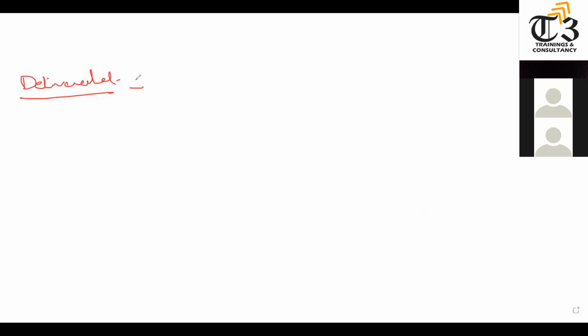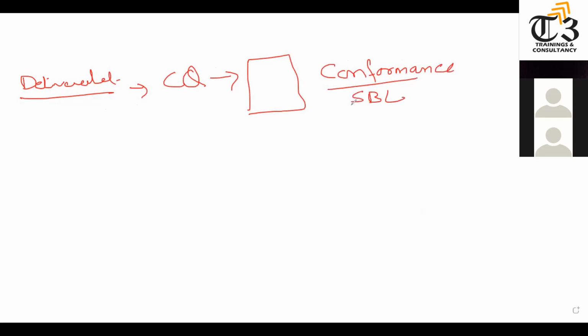Once the deliverable is produced, then control quality guy will appear and he will do the inspection of the deliverable, where he will check the conformance of the deliverable, whether it conforms as mentioned in the scope baseline, where we have multiple tools like control chart, which provides how much plus and how much minus is allowed. If it fits in the conformance, they will approve it. Once quality control passes it, then you will go to validate scope with the customer or sponsor. Validate means acceptance.